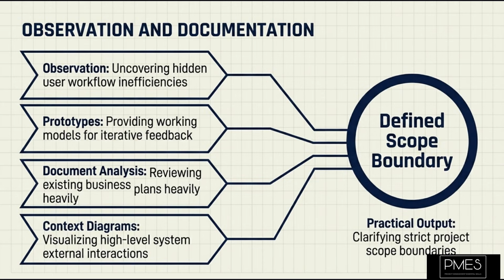Next, we have focus groups. These bring together pre-qualified stakeholders and subject matter experts to learn about their expectations and attitudes regarding a proposed product, service, or result. Imagine gathering a group of end users for that reporting system to discuss what features would be most helpful. Facilitated workshops are another powerful technique.